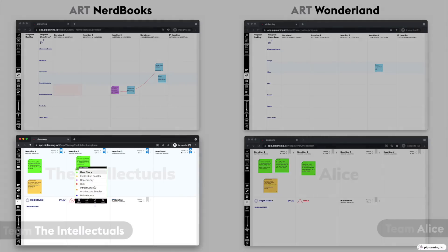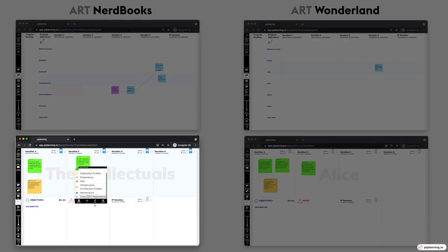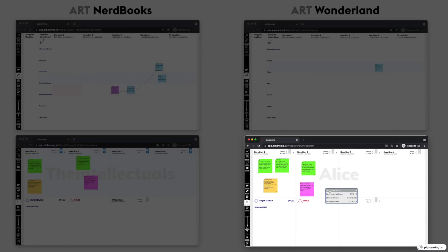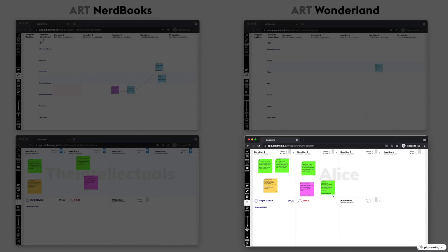When you realize that you are depending on another team from another ART, you simply create a dependency sticky in PI planning.io. The team of the other ART will receive the dependency on their team board, so they can break it down into user stories and plan accordingly.